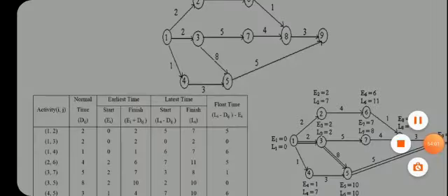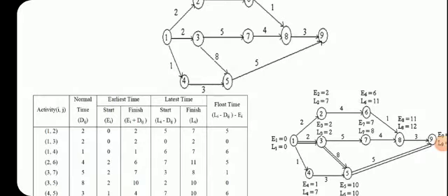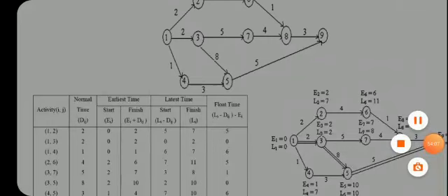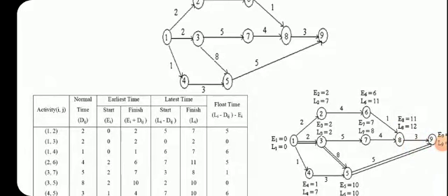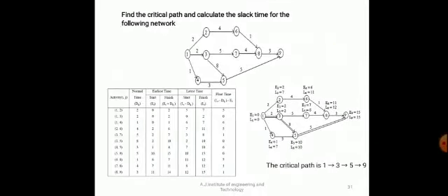These are the main events. This type of problem is what they will normally ask in the exam: how to find the critical activities and critical path activities. Mainly you should know the summary of this. At the end, the critical path is the one where slack is 0. First, while calculating the earliest times, whenever two activities are merging, you consider the maximum time which an activity will take.